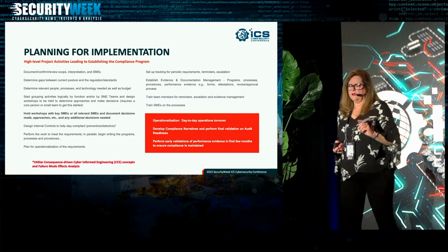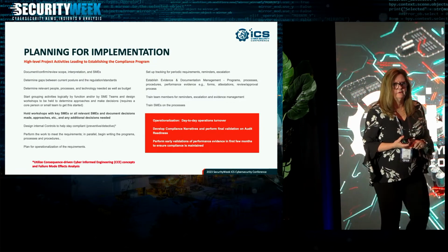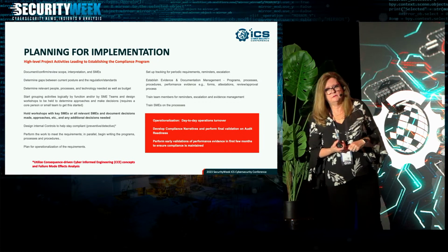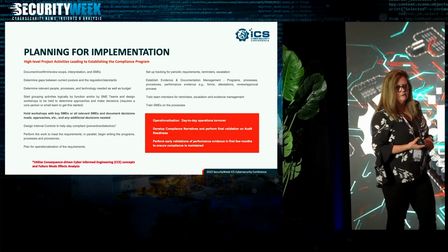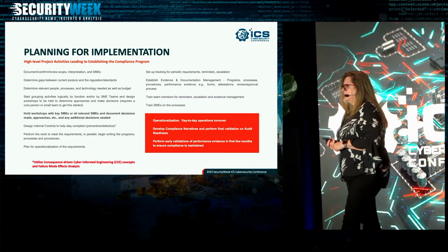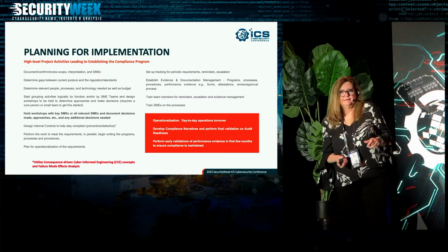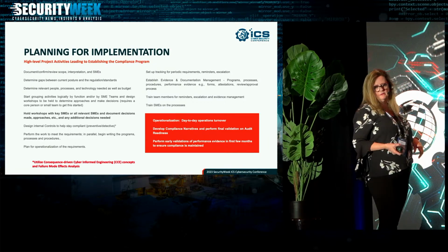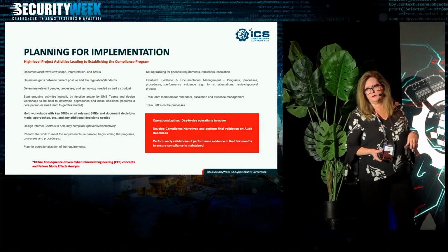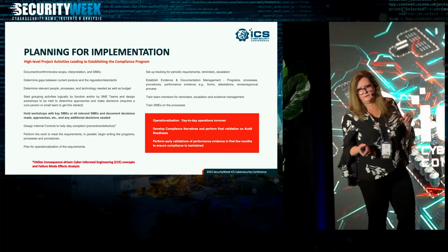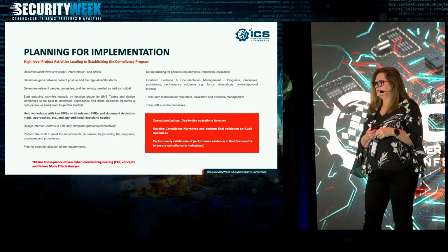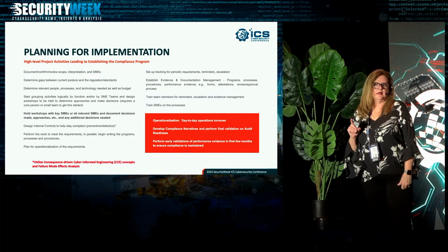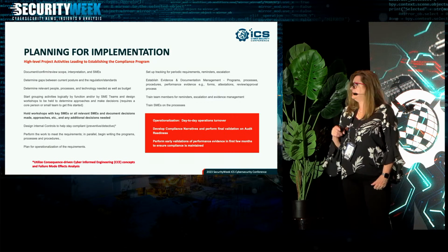The other thing I wanted to call out is you're not compliant till you're compliant. Just because you put in a technology to manage your asset inventory or to patch or to do network segmentation, you're ready to do it, but you didn't do it yet. You've got to get that inventory in there with all the required attributes, all the attributes that are going to help you run your program. You've got to do your first phase of patching. You've got to set up some zones for your segmentation. So don't forget that operationalization has to be part of your project.